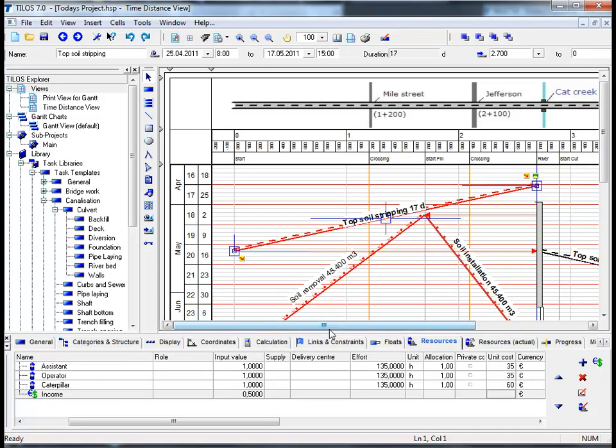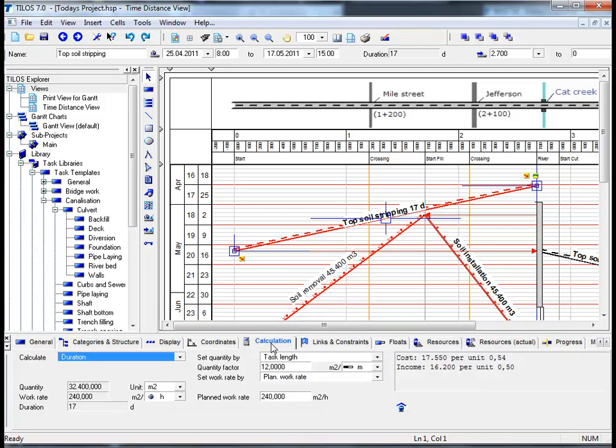If we insert by double clicking this field the input value 0.5 and confirm this by clicking on OK, if we then click on the calculation view tab in the details toolbar we can now see on the right hand side that the cost is 17,550 euros at a unit cost of 0.54 euros. Below we have a fixed income of 16,200 euros at a unit price of 0.50 cents.